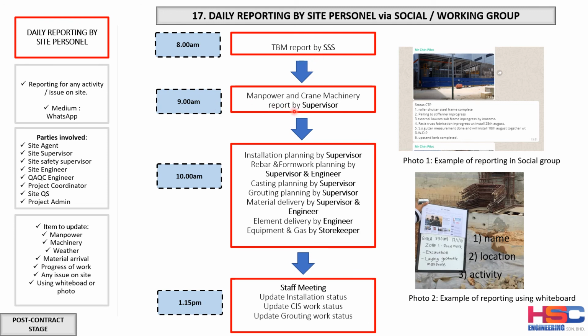At 9 a.m., after this TBM, the site supervisor will gather the information about the day and post it in the group. What are the manpower and the crane machinery? And at 10 a.m., the supervisor will do the installation planning report and put it in the WhatsApp group.